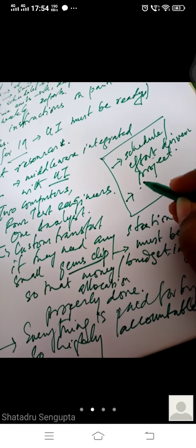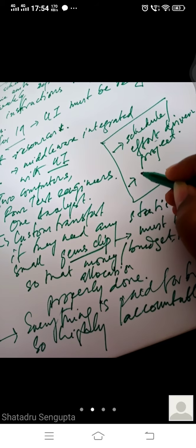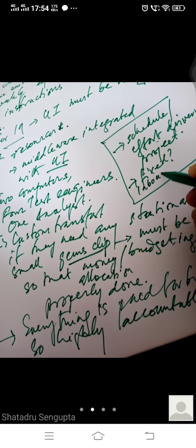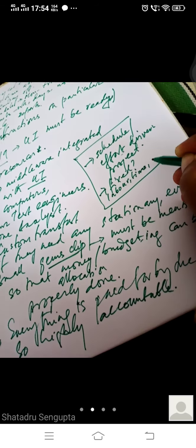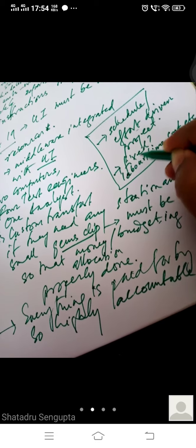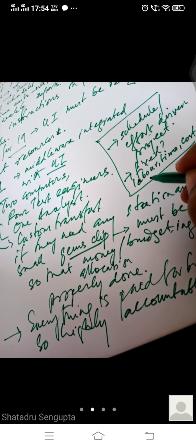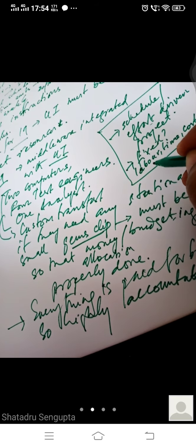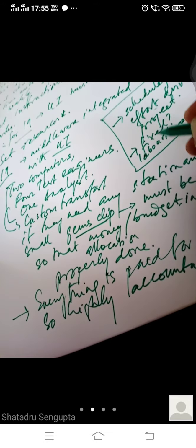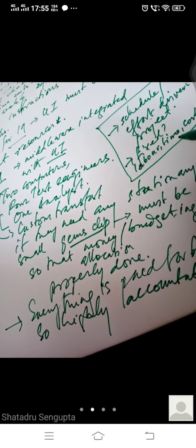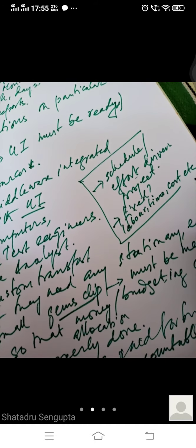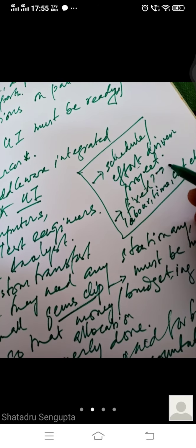Another one is, what do we have if there is a fixed something? Is there anything fixed? That means labor, time, cost, etc. These are three basic ones. Etc. means other aspects also. Is there anything fixed? For example, let's say there are 40 engineers working on the project and it is fixed. That means whatever we have to do, that work will have to be done by 40 engineers. The time, let's say we can go anywhere from 40 to 400 engineers if we want to, but the time is fixed to say 15 days, etc, etc. Cost, whatever we do, we have to do it within say 10 lakhs of rupees. So is there anything fixed? Then there are other things also. Is there anything fixed in the project? That we also have to decide.